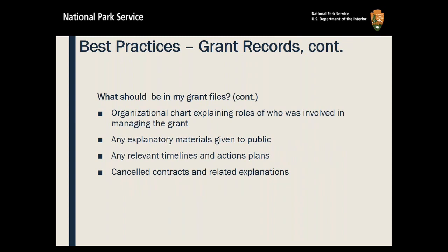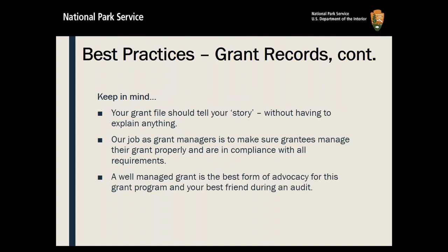What should be in the grant file? Continue. An organizational chart explaining the roles of who was involved in managing the grant, any explanatory materials given to the public, any relevant timelines and action plans, canceled contracts, and related explanations. Keep in mind, your grant file should tell your story without having to explain anything. Our job as grant managers is to make sure grantees manage their grant properly and are in compliance with all requirements. A well-managed grant is the best form of advocacy for those grant programs and your best friend during an audit.